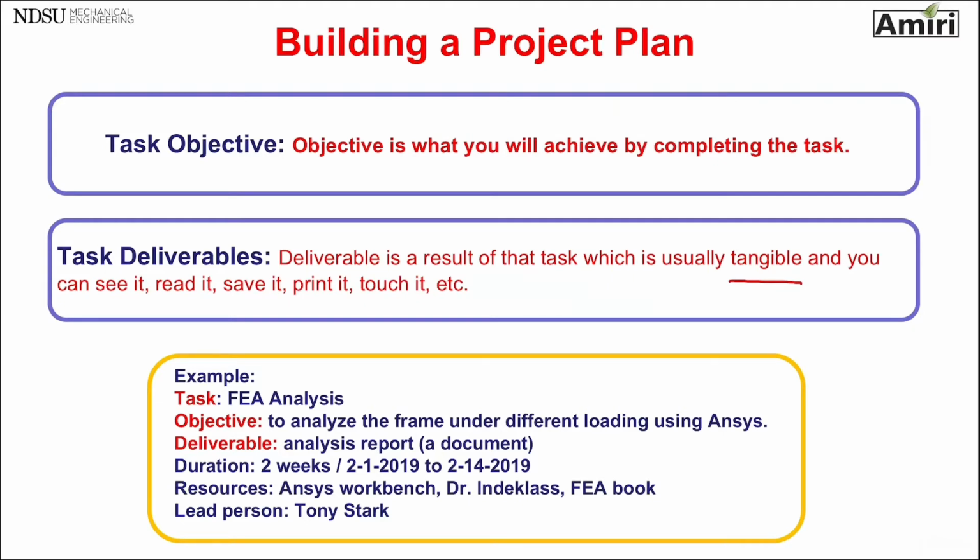I saw one time a team put doing FEA analysis, objective was to analyze a frame or do examples to learn FEA. The deliverable was feel confident enough about FEA. That is not a deliverable, because how can you measure or how can you see a feeling? Who says if you're feeling comfortable enough or not? So again, this is important.